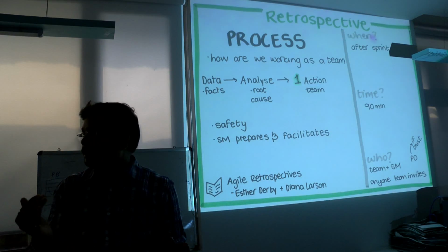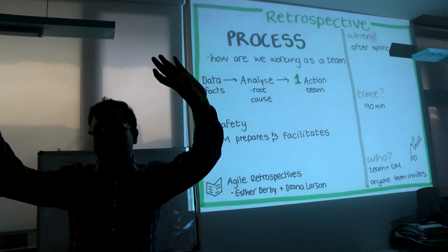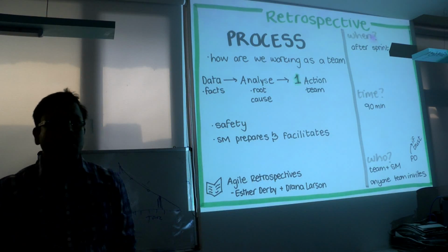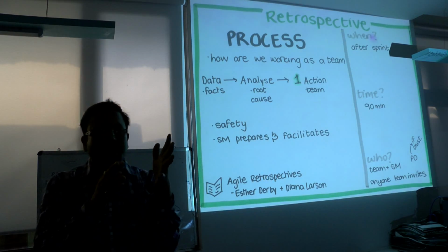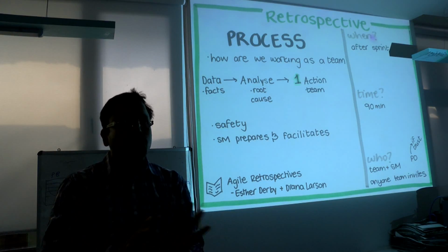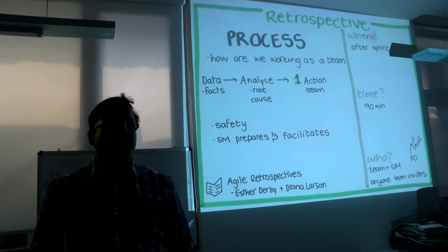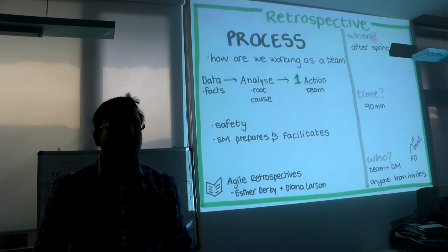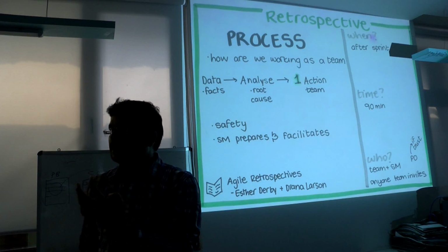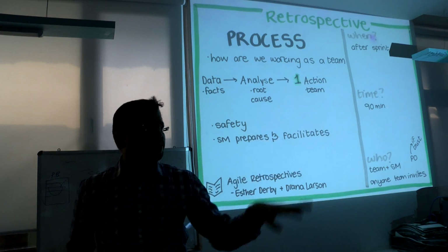Once the services came, we just removed that class, linked our business layer to those services, and everything was working. So that was the retrospective, that was our lesson learned: next time we can do it like this and do it faster. Do not rely on and wait for those services. You can always face the same issue, and you can always take many positive things that way. Okay.